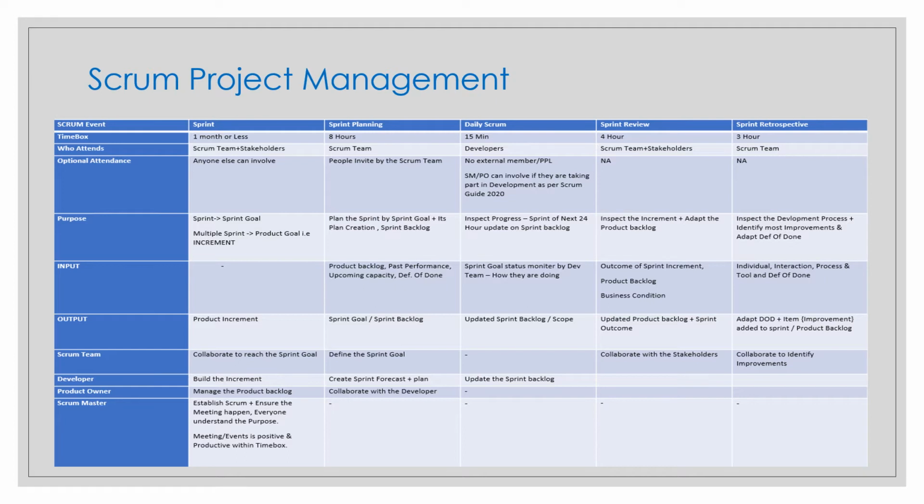For the Scrum team, they then get into the refinement activity, and they work on each PBI, the story point, and their estimation. The story point and the estimation depend on the complexity of the requirement or the feature. There is only one product at a time for a team. Managing the product backlog is an ongoing process. While the product owner is accountable for the product backlog, they can order, add, and remove product backlog items anytime they want.